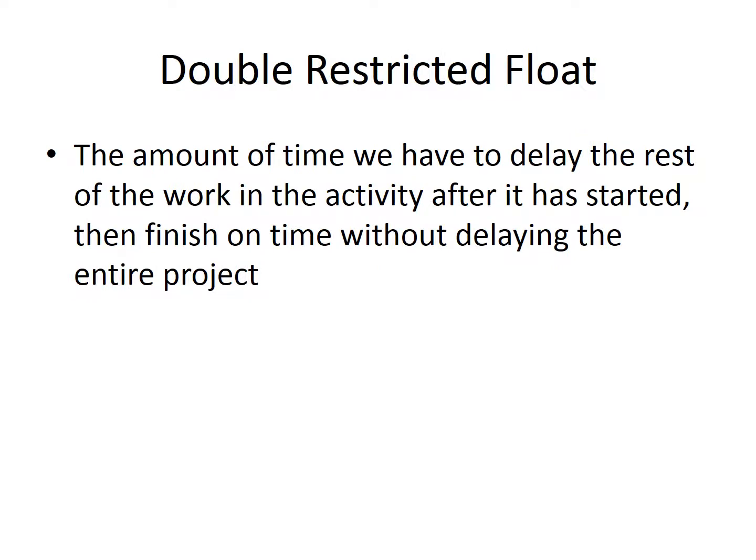Sometimes, especially when an activity is linked via multiple logical relationships, I'll have what we call double restricted float, and that's the amount of time we have to delay the rest of the work in an activity after it's started, then finish on time without delaying the entire project.